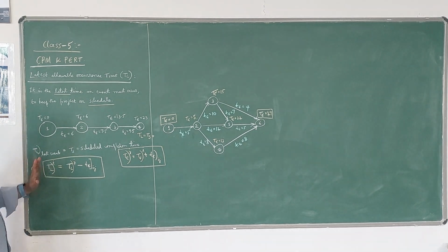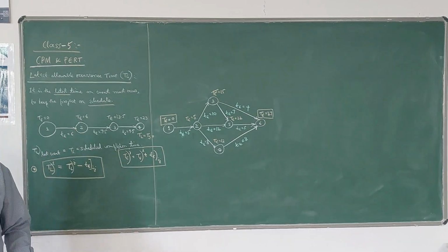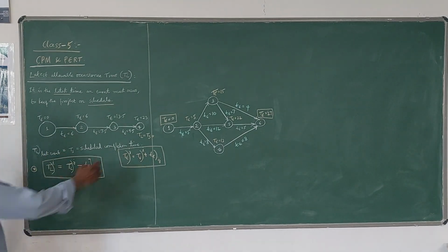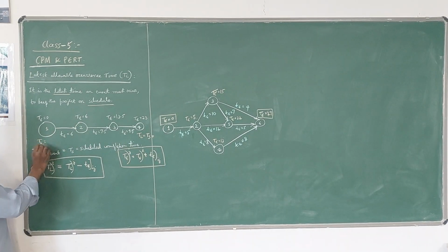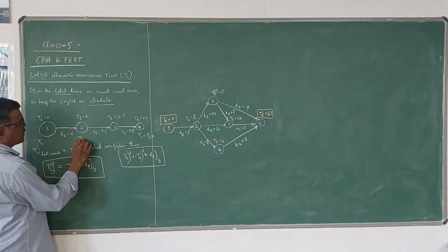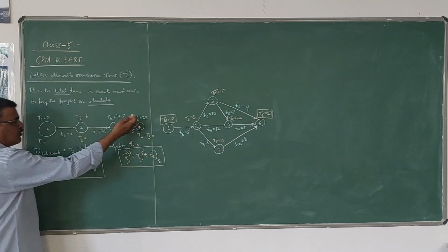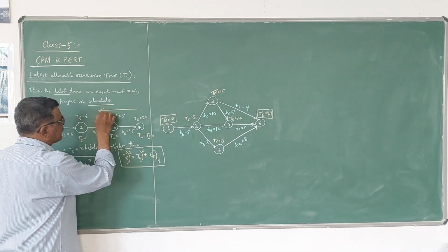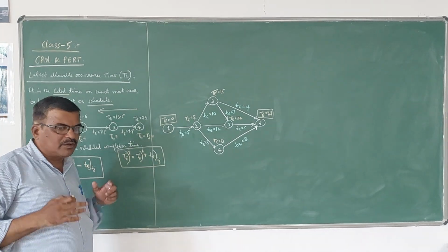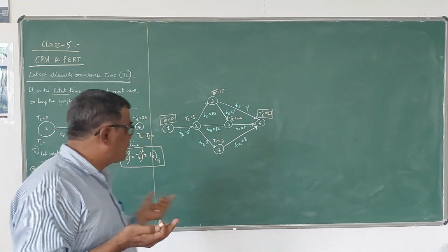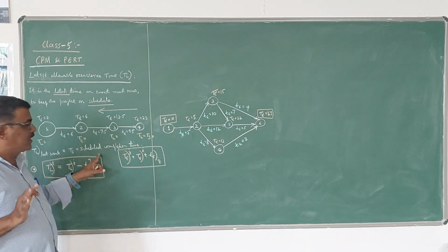Now this example is a single path example. Let us see how we can calculate the final value of TL. All these TL values are written below the circle. TE values are written above the circle, TL values are written below the circle. We have to move in the backward sense here. In this case, we will know the TS value, that is, at what time the project has to be completed or scheduled.